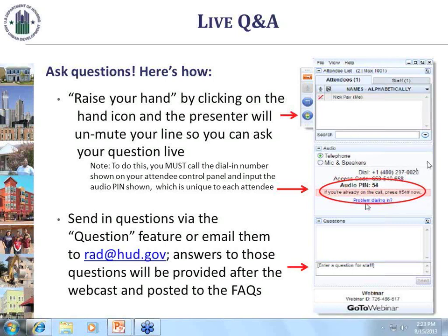And so if you need to hire a development consultant or an architect or an engineer, then you don't have to go out and do formal bids. You can generally just get 3 firms, ask them to give you quotes, and you can make some decisions on it. So that's if you are trying to spend it prior to closing.